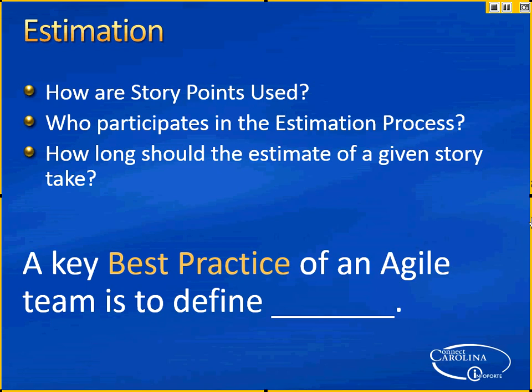Story points are comparative numbers that we use to say, this is kind of like that. We gave that 3 story points, so we'll give this 3 story points. It's part of that estimation poker. So story points are how big you think this particular story or epic, which are sometimes sized using story points, is relative to other similar stories that you've worked on.